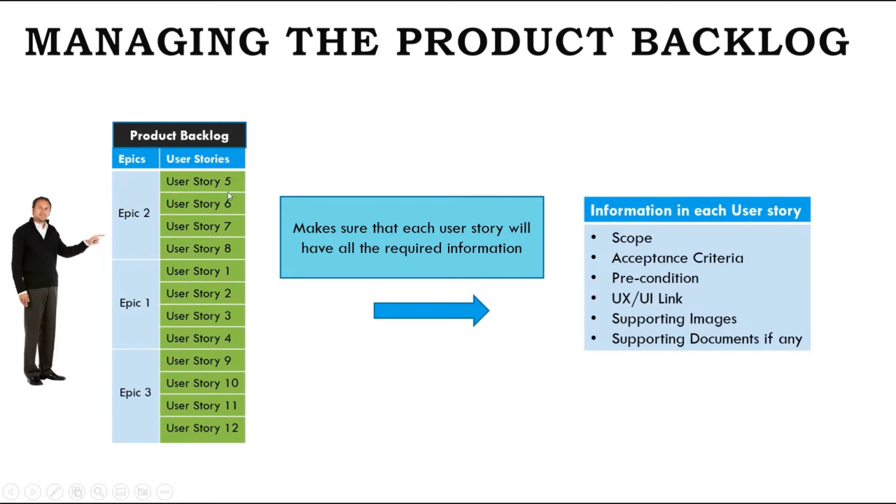Then he will make sure that each user story has all the required information like scope, acceptance criteria, precondition, UX or UI link, supporting images, and supporting documents if any.